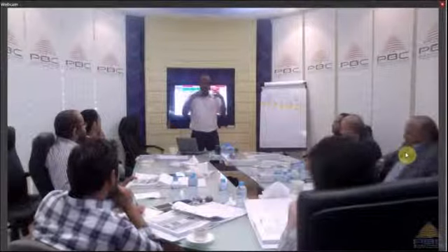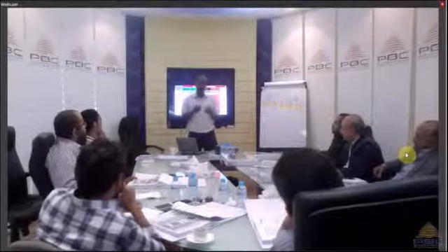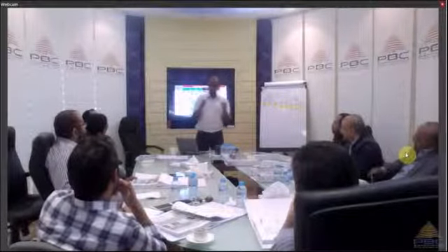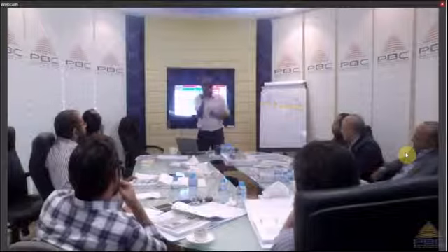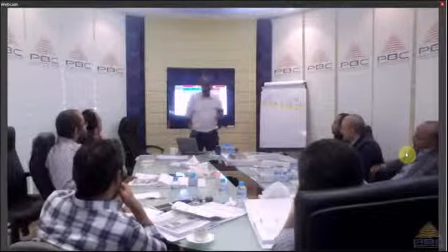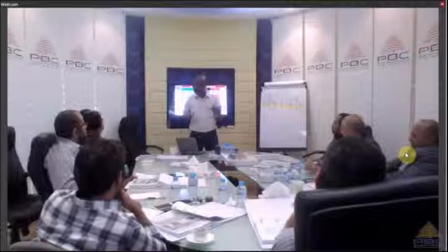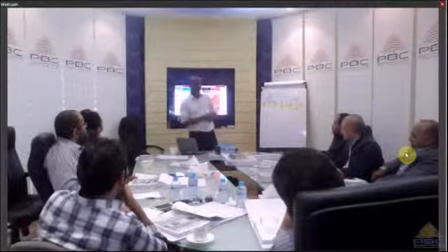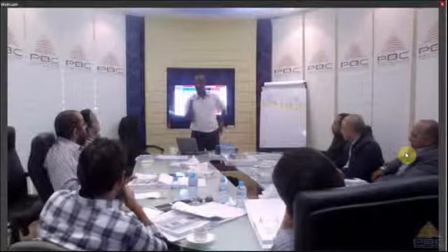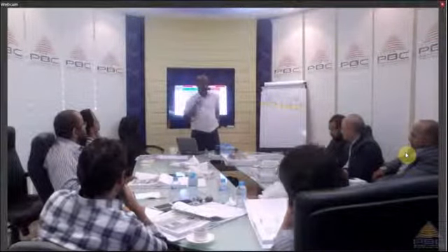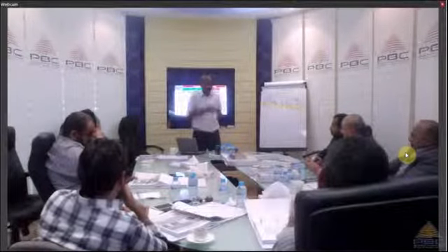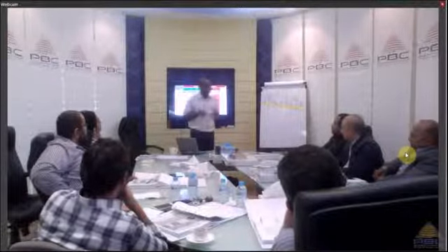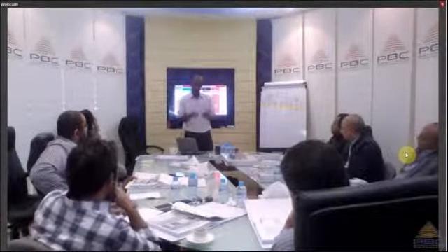So when we are wise project managers, before committing to saying, oh, it will take 1 week, or it will take 2 weeks, we need to step back and think about the resources needed before we can commit to dates with senior management. It's good practice to do that. Because experience tells you, oh, this will only take a week. But you're making dangerous assumptions here: the availability of resources, of machinery, the skill of the workers, and so many things. But when I think about all these things, I can come up with durations that are more realistic.